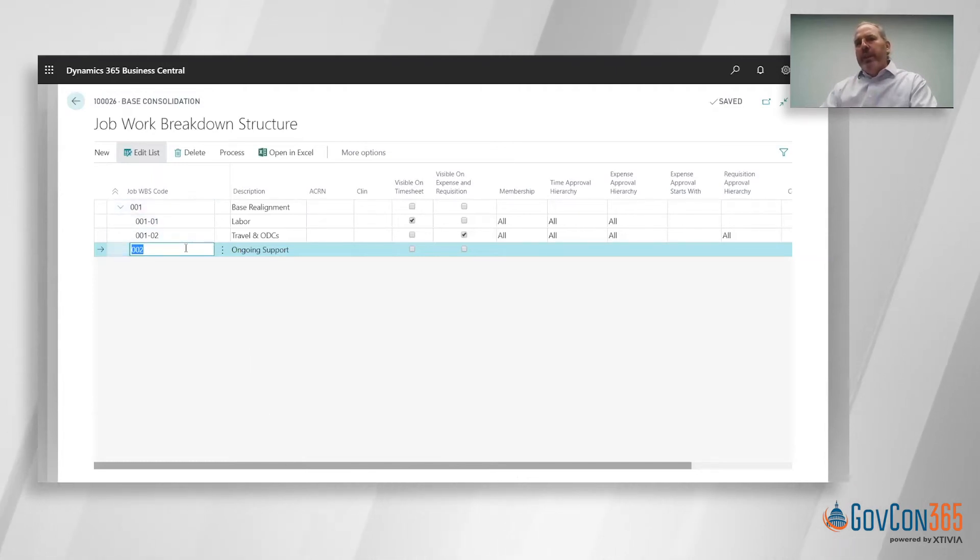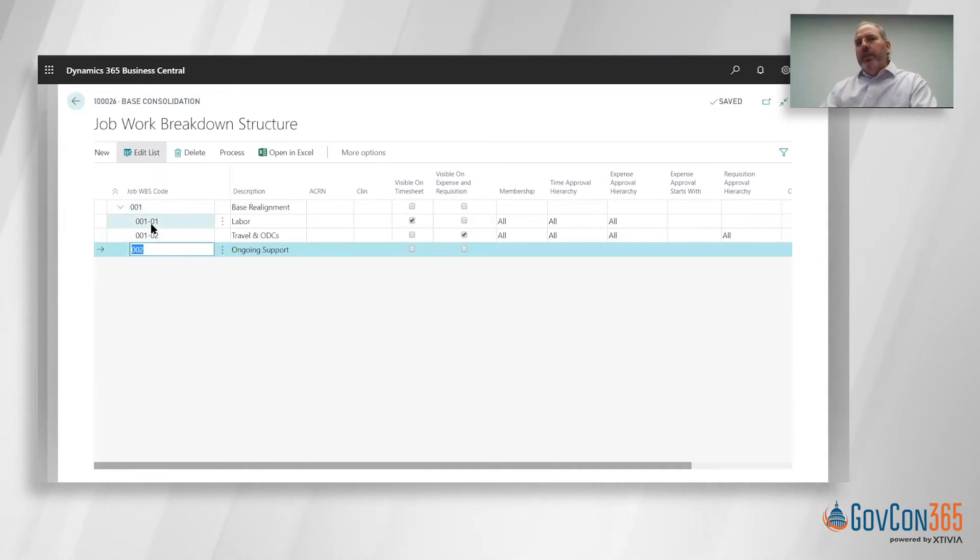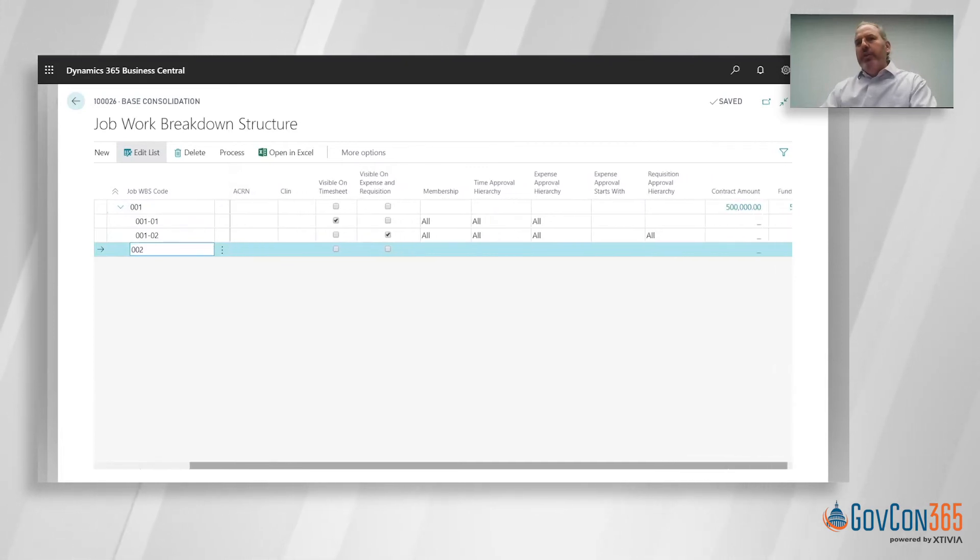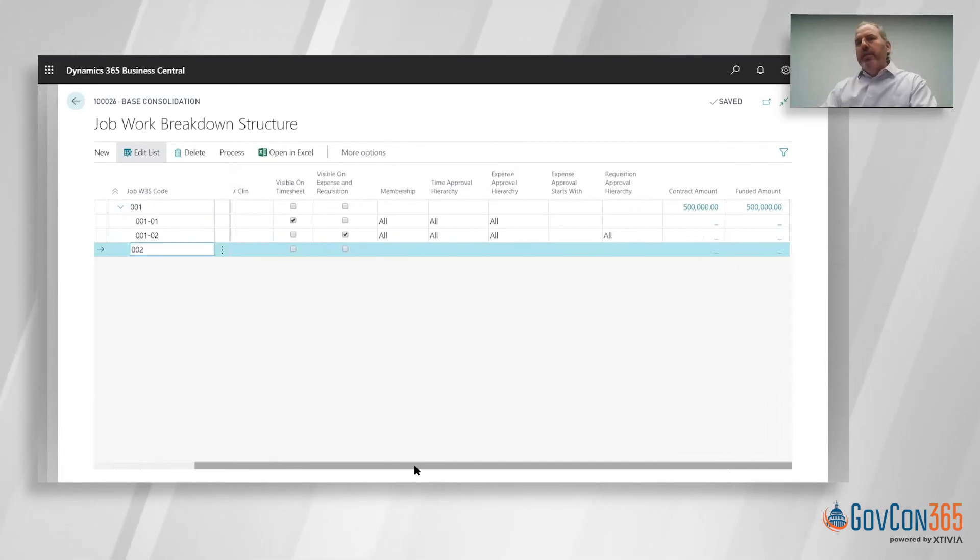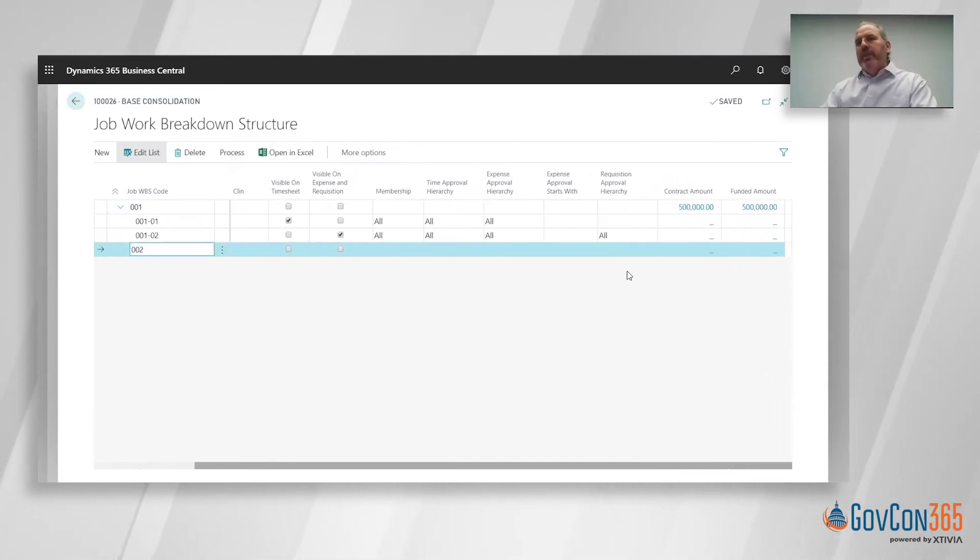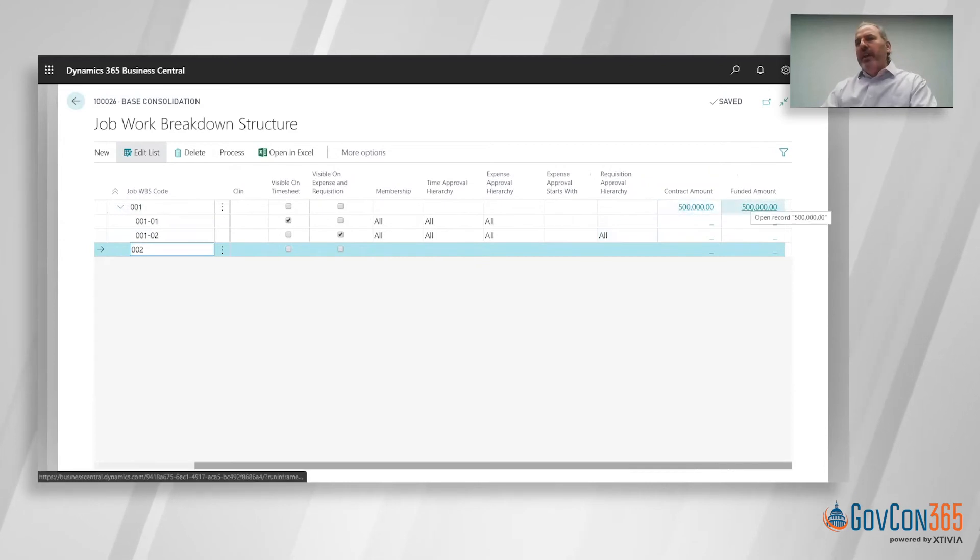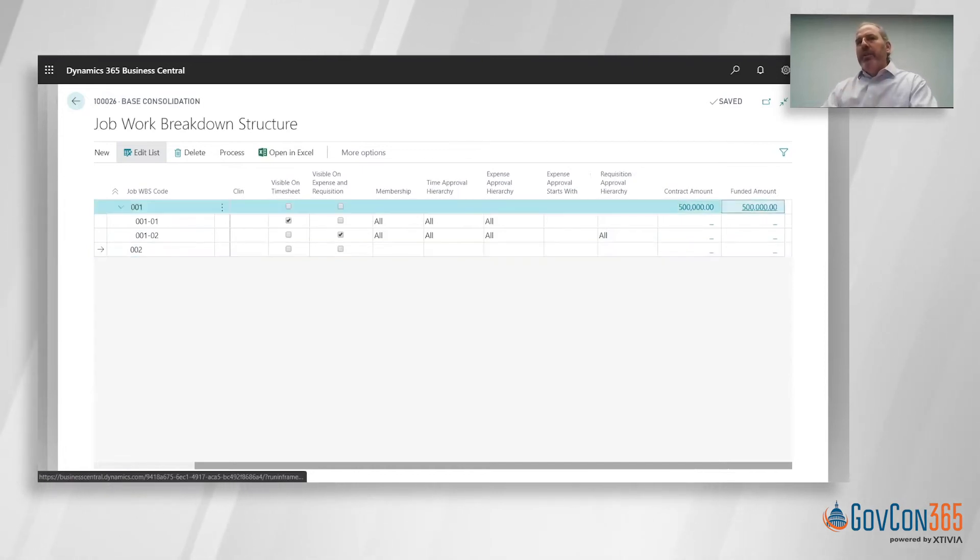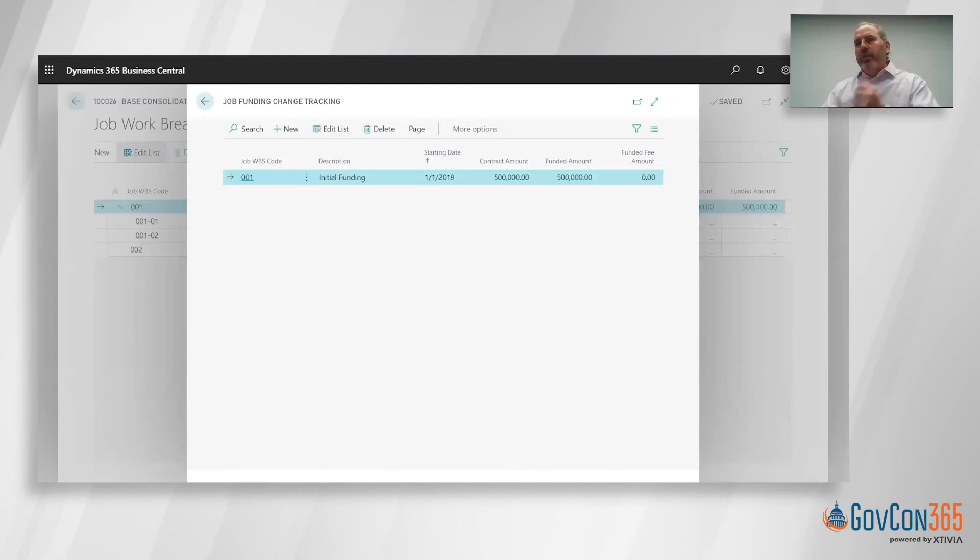This work breakdown structure is a 60 character alphanumeric field. You're separating the levels with a dash, so we've got this top level for base realignment. As I scroll over to the right, you're going to see the total contract and funded value. If a mod was issued against this, we can either go through this section or there's another spot to go in.